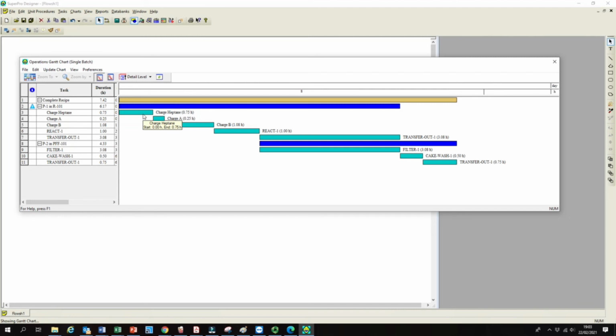So we need to know how many minutes we spend on each and every operation that we perform on any unit procedure. It can be filtration, drying, or evaporation, or other unit procedures like crystallization, adsorption, or ion exchange, for example. We should know the time, like what's the setup time, what's the process time, how many minutes we need to charge your solvent, how many minutes you need to load your other reactants. So everything matters. This is the Gantt chart that we developed so far.